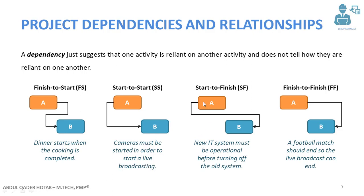Another type of relationship is Start-to-Finish, where the predecessor must be started in order to consider the successor completed. For example, new IT systems must be operational before turning off the old system. Once the installation of the new IT systems is completed and they are operational, that is when you can stop the old IT system.